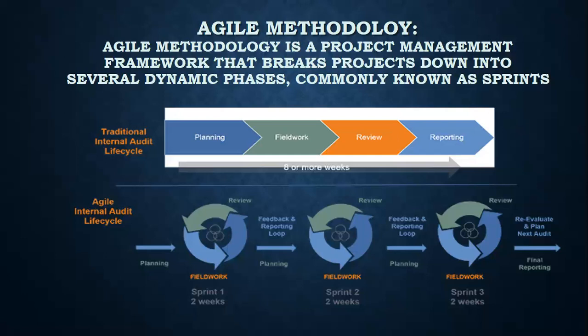And every sprint will be for 2 weeks. So every 2 weeks a new release will happen. Once the release happens, it will move to the next phase. In the next phase, is there any code change in that feature? Again, it will come to planning, and there that piece of code will be implemented, and it will move to the next release.